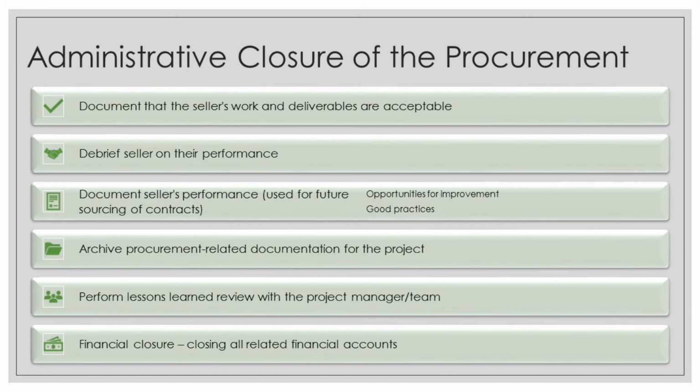And we document that the work and the deliverables are acceptable. We debrief the seller on their performance, and we document their performance, and this will be used for future sourcing of contracts. And also we allow the seller to understand if there are opportunities for improvement and to install good practices.